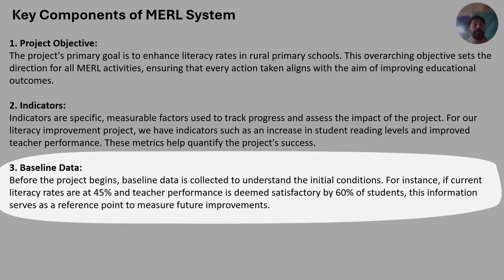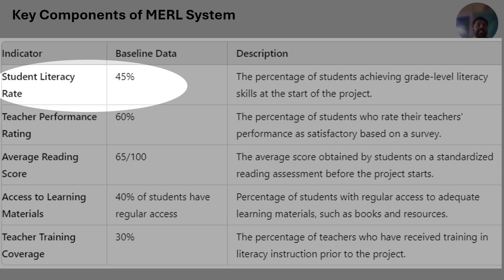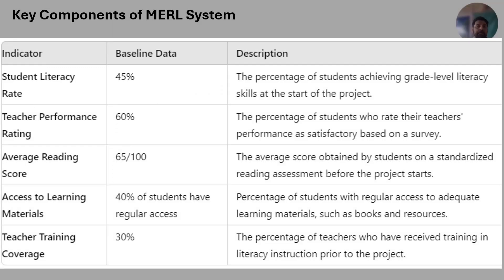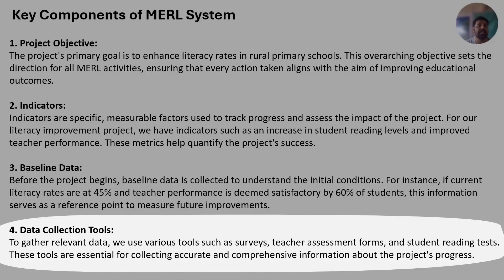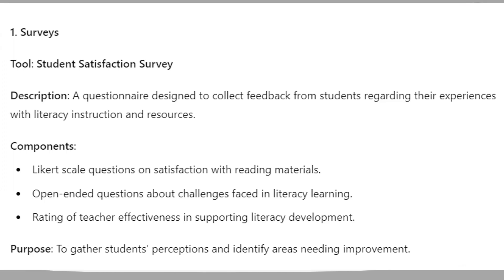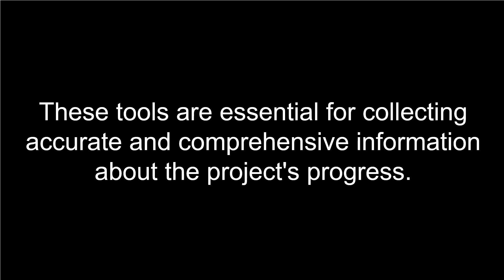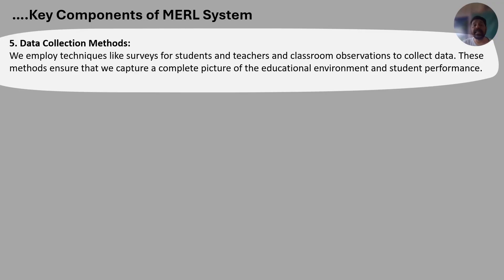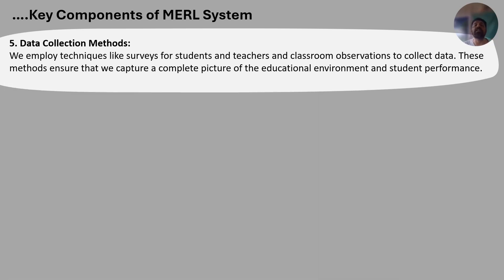Baseline data is collected before the project begins to understand initial conditions. For instance, current literacy rates at 45% and teacher performance deemed satisfactory by 60% of respondents serve as reference points to measure future progress. Data collection tools include surveys, teacher assessment forms, and student reading tests. Data collection methods include surveys for students and teachers and classroom observation to capture a complete picture of the educational environment.